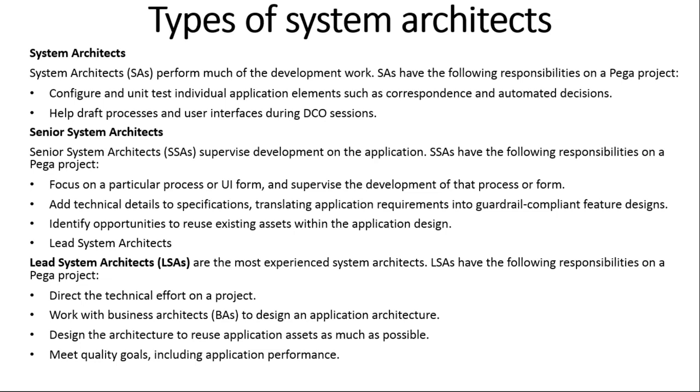In the current sprint, as I said, if I have 3 users, I will be taking 3 stories. If the complexity of the story is a little bigger, then only 3 stories I will take. Otherwise, sometimes it is just labels and some text boxes. In that case, I will be taking the customer form, and the transfer money details form, or address change, one more form. So I'll be taking 2 stories. Why? Because it is just adding the properties into the form. So by one developer, 2 stories.